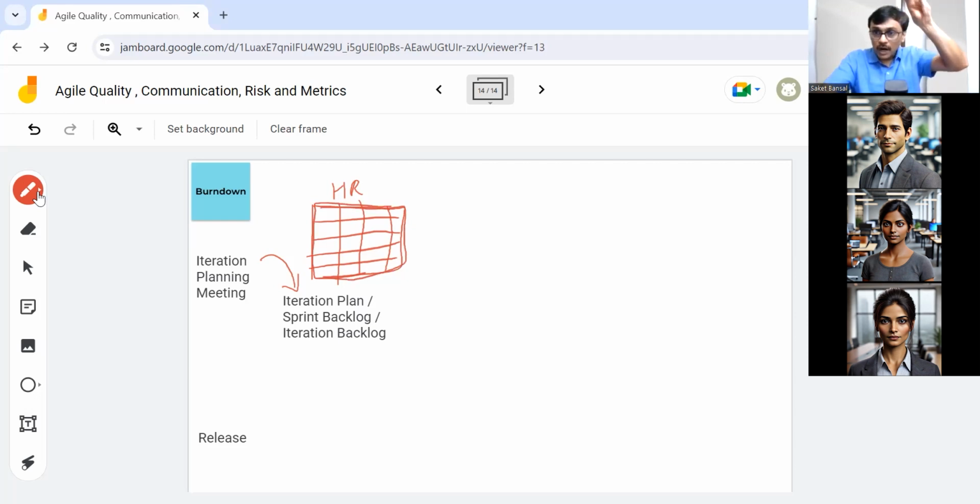Now, how do we see how we are progressing in this iteration? So an iteration level burn down chart can help you in doing it. You can say, let's take a sum total of the number of pending hours in this iteration. So each work has been identified. We identify the total sum. And since we are planning for these 2 weeks, let's make a work reduction chart.